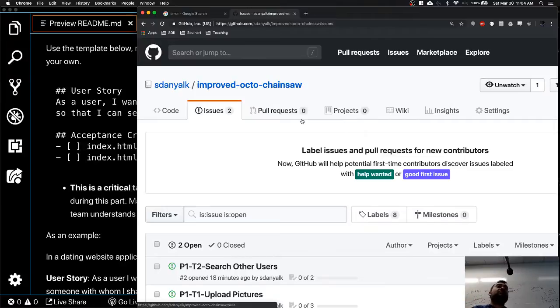So be smart about it. If you have a 2 weeks project, how do you divide your sprints? So how many days? Like 10 days? Okay. If you want 2 sprints, you can do 5 and 5. I still think 2 is relatively too small. I would divide it further. You could do like 3, 3, 3.